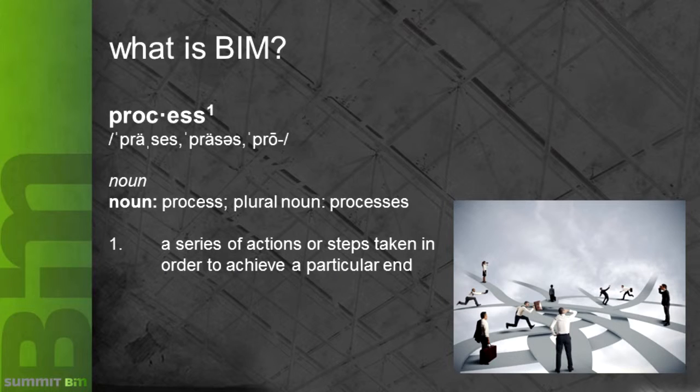So what is BIM? At the bottom line, BIM is a process, not a piece of software. It's a series of actions or steps taken to achieve a particular end. So you need to consider the end at the beginning. What is it that you need the data to be capable of doing when you get it at the end of the day? That drives your requirements into the front end and into what you want the designers to do. That needs to go into your RFP.